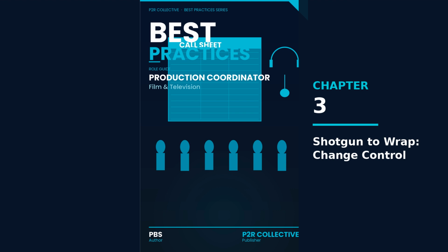When you run the change control loop consistently, you stop chasing symptoms. You start catching the first signal of trouble, before crew time gets wasted, before tracking gets corrupted, and before reshoots turn into a second production because the first one wasn't documented cleanly. Keep your loop simple and strict. Log it, classify it, validate the impact, update the version truth, publish once, enforce status rules, and confirm receipt. That's how you keep today from quietly breaking tomorrow, especially when the schedule shifts, holds, and reshoots hit back-to-back.